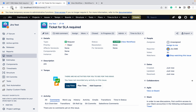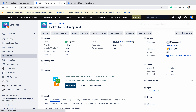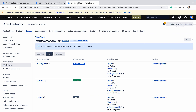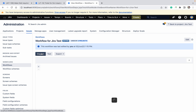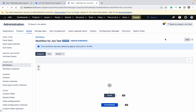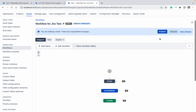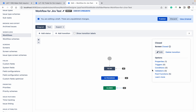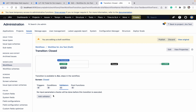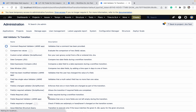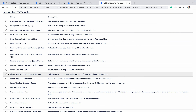Refresh the page. First open the ticket — I was able to close the ticket now, but I don't want that. I want to make that field mandatory. Go to the edit button again. While closing the ticket, where should I add that? I should add it in the validator because it's validating the data. Click on add validator.